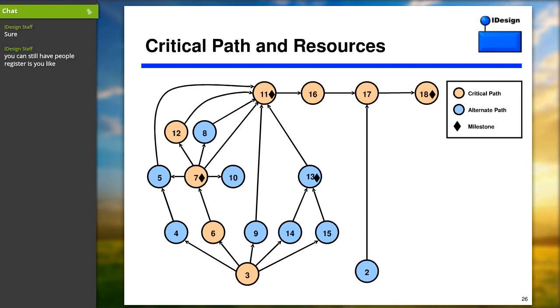I don't know. The tools I use are, of course, PowerPoint, the best design tool there is. But why are you asking about project design? What about system architecture? How come we don't have good tools for system architecture? The three tools I use when doing project design: I use PowerPoint for the diagrams, and MS Project for the actual scheduling of tasks, because MS Project is awesome at scheduling individual activities, and great for calculating things like float.